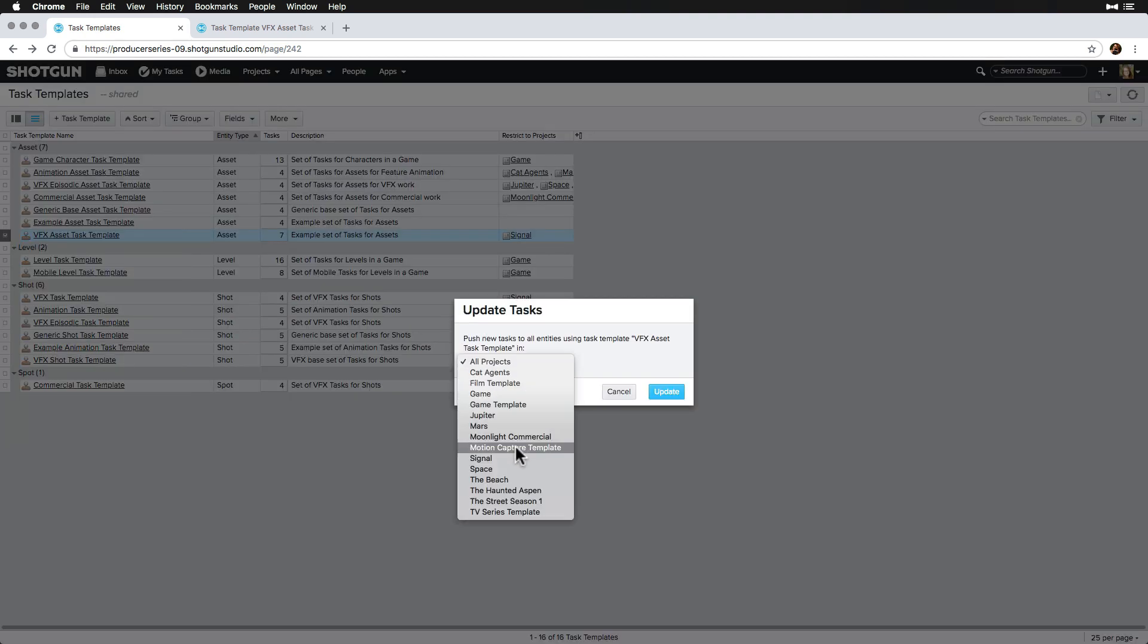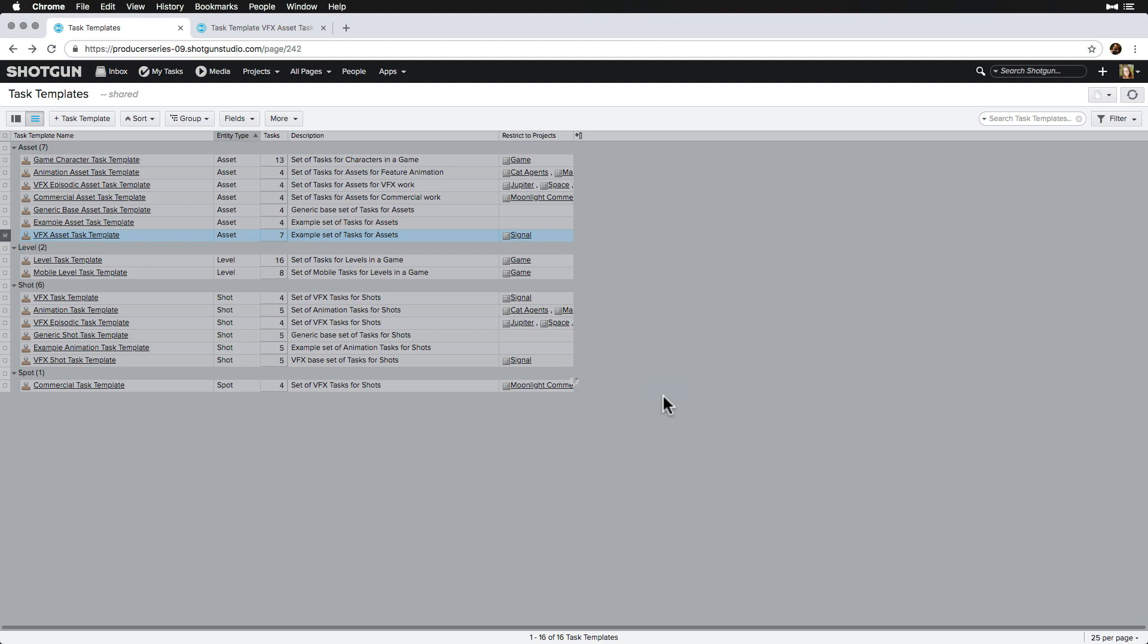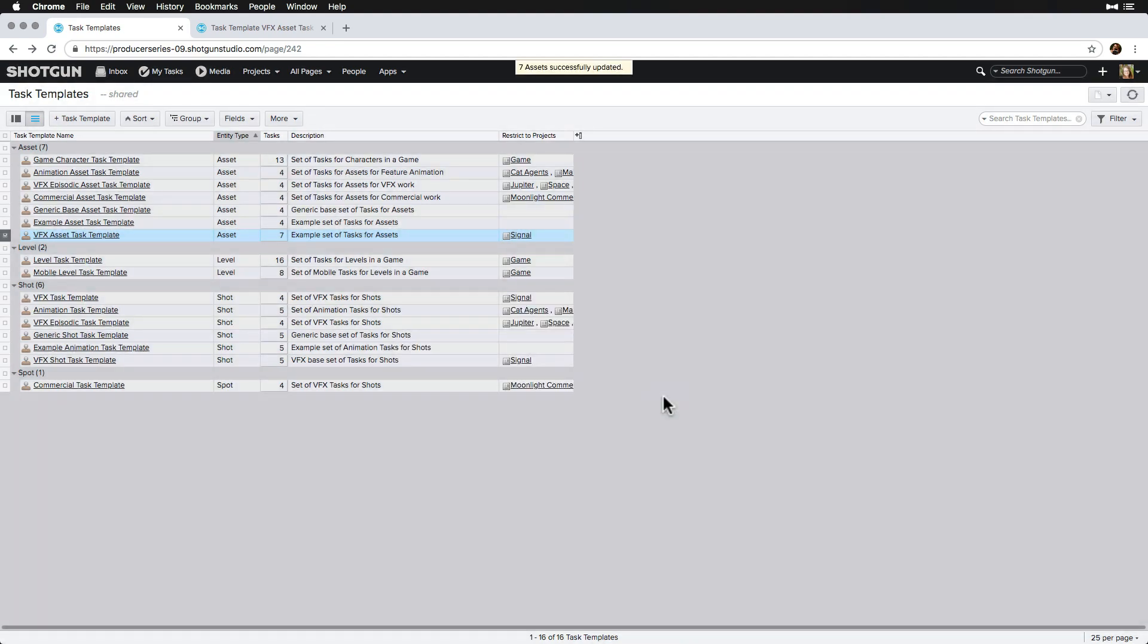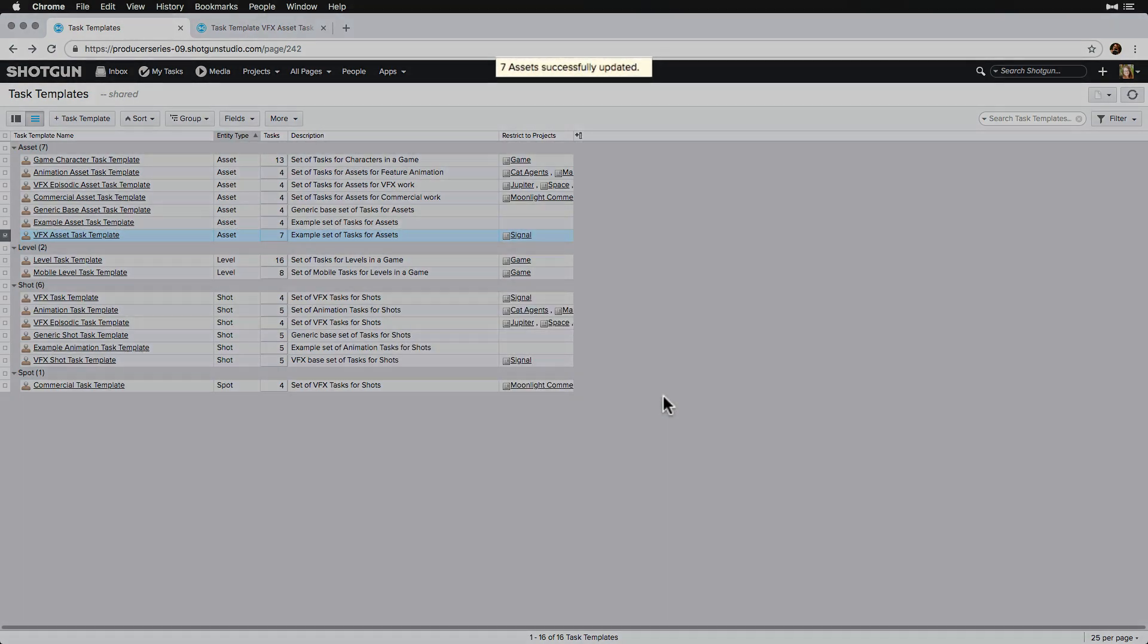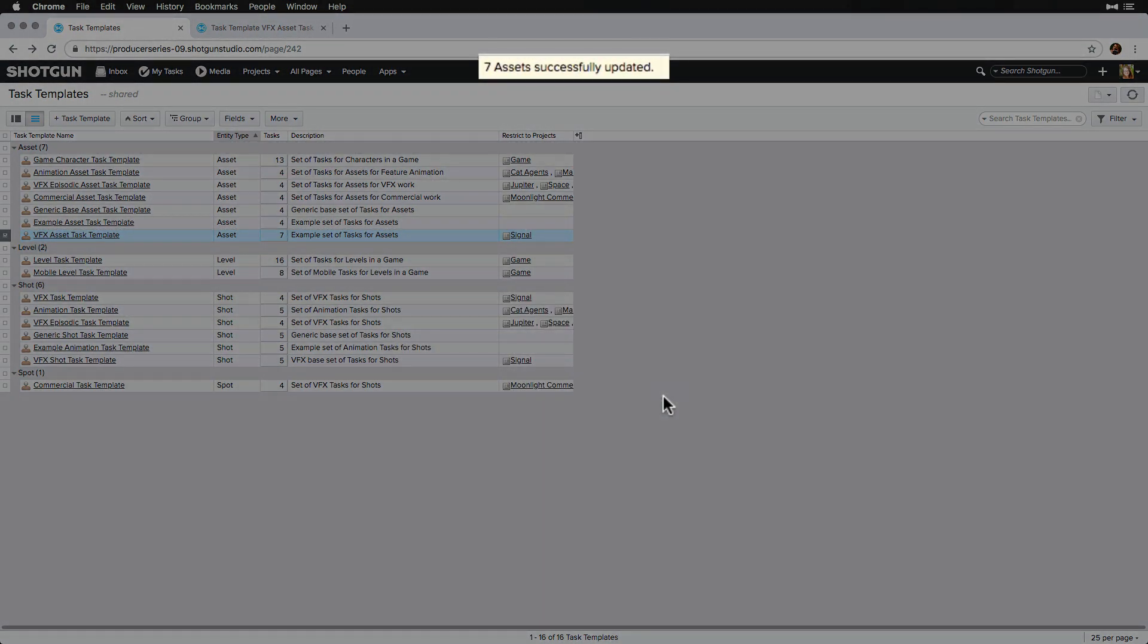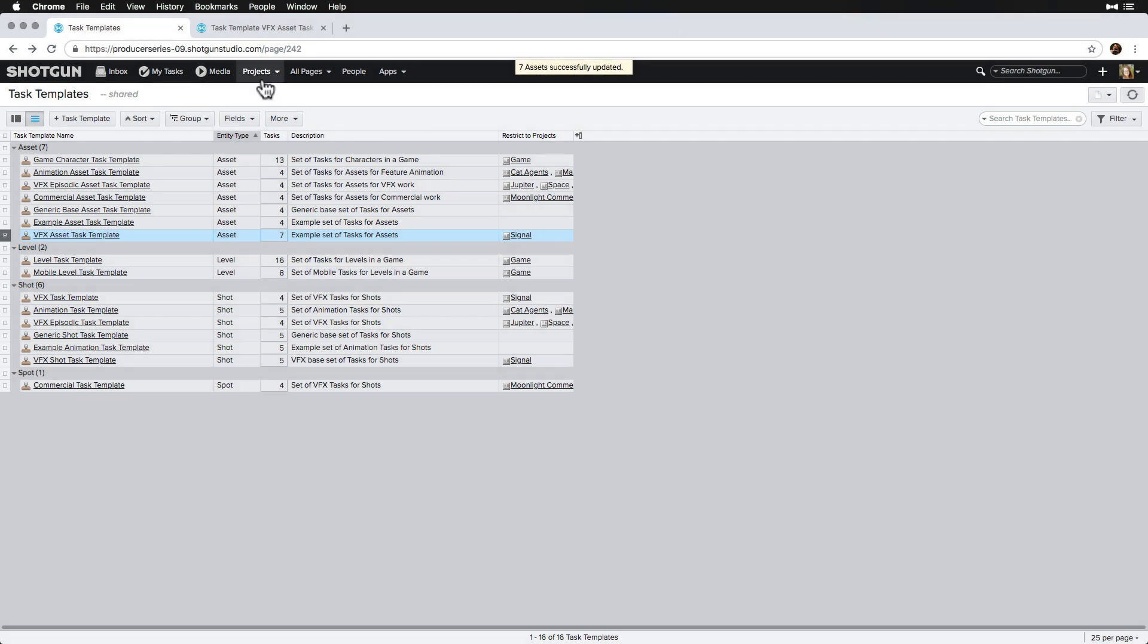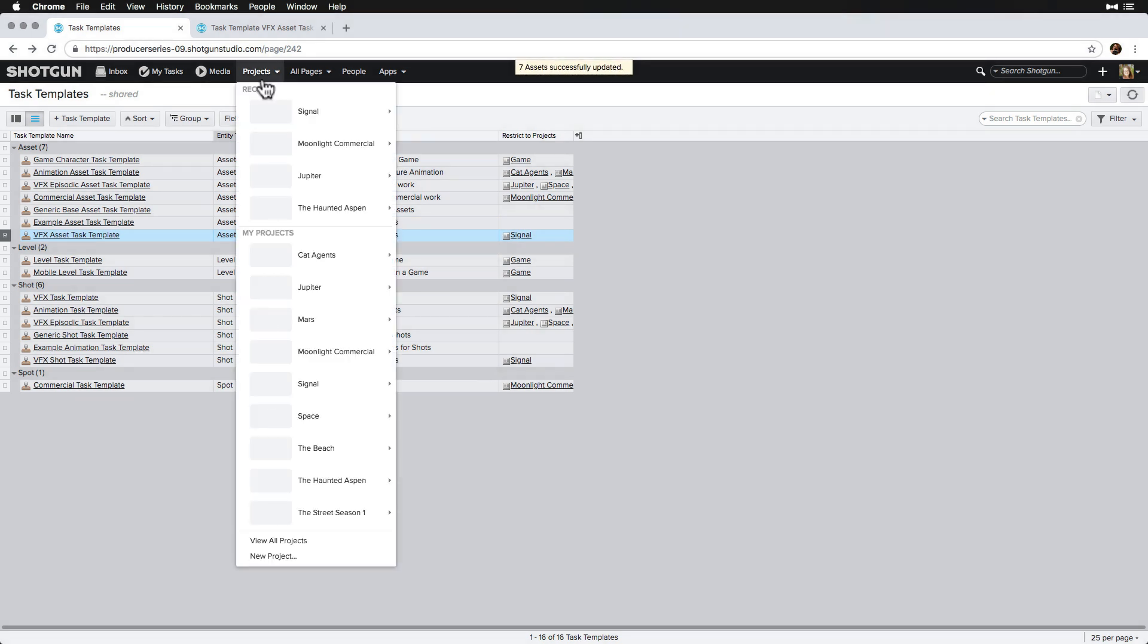Right click on the task template and select update entities with new tasks. We select our signal project, update, and now we can see at the top that the seven assets these task templates were linked to have been updated with a new QC task.